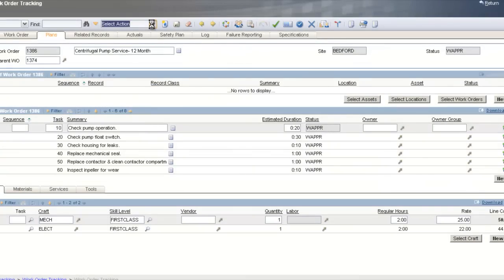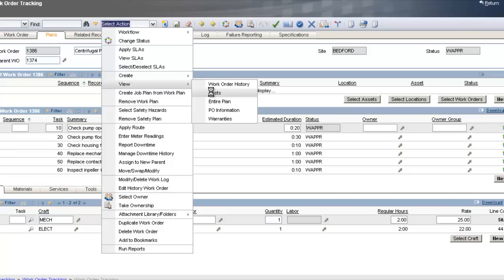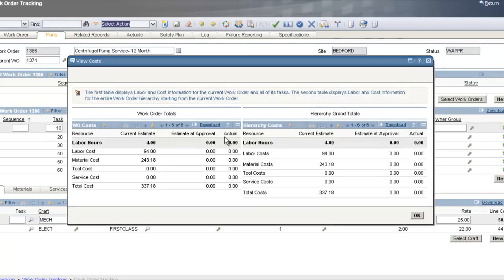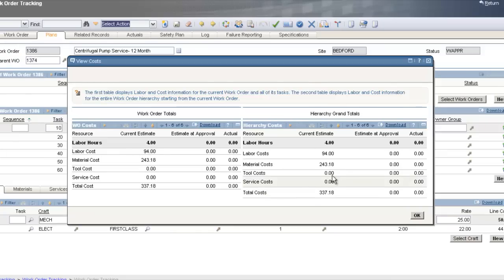Going back to Select Actions, View, Costs — here we can see all the costs for this work order at the bottom level. This shows all estimates including labor, labor hours, and material costs. If this work order had a child, all costs would roll up the hierarchy. This shows the grand total for this individual work order.